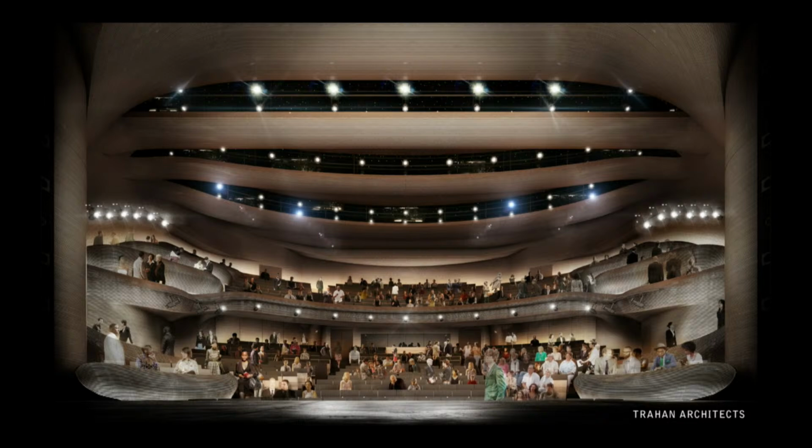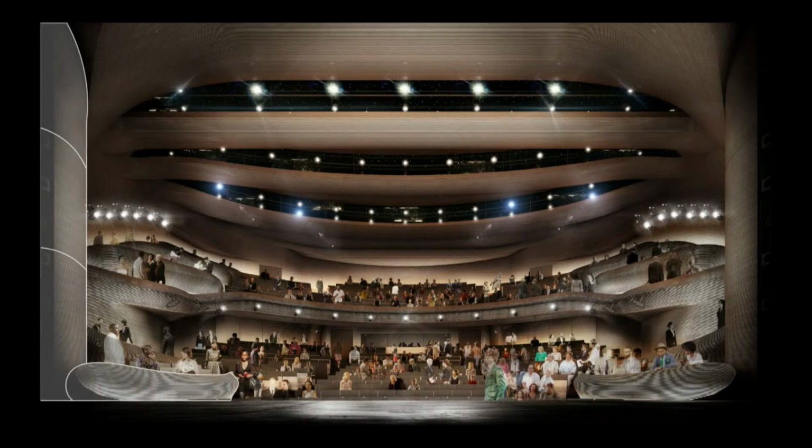It took us 800 man-hours to do the initial bid, and about a year to get to the point where we had an approved budget to build it. And that was before we started the contract to actually build it. So for something this complicated, there's a huge investment of time, because if you get it wrong, it gets very expensive very quickly. And so that's where the digital side of our process really comes into play.